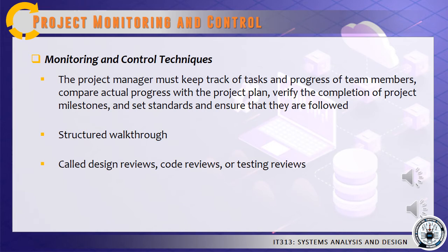To help ensure that quality standards are met, many project managers institute structured walkthroughs. A structured walkthrough is a review of a project team member's work by other members of the team. Generally, systems analysts review the work of other systems analysts, and programmers review the work of other programmers as a form of peer review. Structured walkthroughs take place throughout the system's development life cycle and are called design reviews, code reviews, or testing reviews depending on the phase in which they occur.